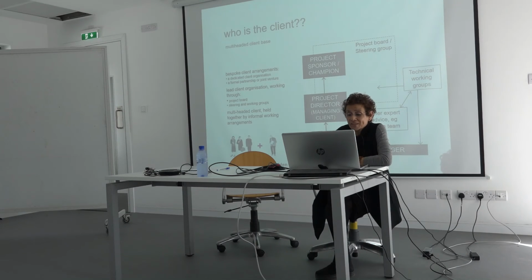The second thing is, of course, the client, and independently of who pays you, it's always a multi-headed client base. For example, even on a simple commercial master plan, the head of planning was actually a client, because unless we could convince him that what we were doing was right, the project wouldn't go ahead. So despite the fact that we were paid by a single person, we had to talk to and consider the project manager and the leader of the council, the local authority, as well as the developer, our client base.